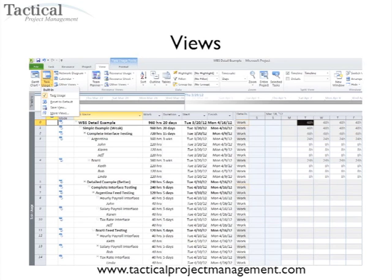Next are the different views. In this case, I've looked at the task usage view, where I wanted to get a list of all the tasks and all the resources assigned to them so I could do proper resource loading and get an idea of where people were allocated on the project. Microsoft Project has a wide variety of views, and it's definitely worth your time to orient yourself to the different views and how you can access the different data.